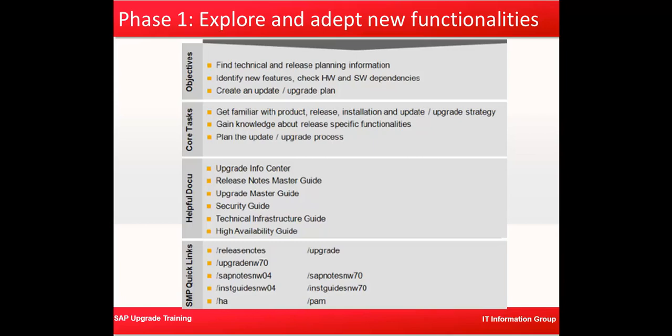So basically this is an exploring phase where we try to find out, in case we want to upgrade, is a hardware upgrade required or not, can we directly upgrade from the current version to the new version, or do we need to upgrade to an intermediate version? Do we need to upgrade, say, the operating system before we can upgrade? Do we need to upgrade the database before we can do an SAP upgrade? These are the dependencies which need to be taken care of. Apart from that, we need to see whether we need to apply the latest service packs before it can be upgraded. All that is explored and evaluated during the explore phase.